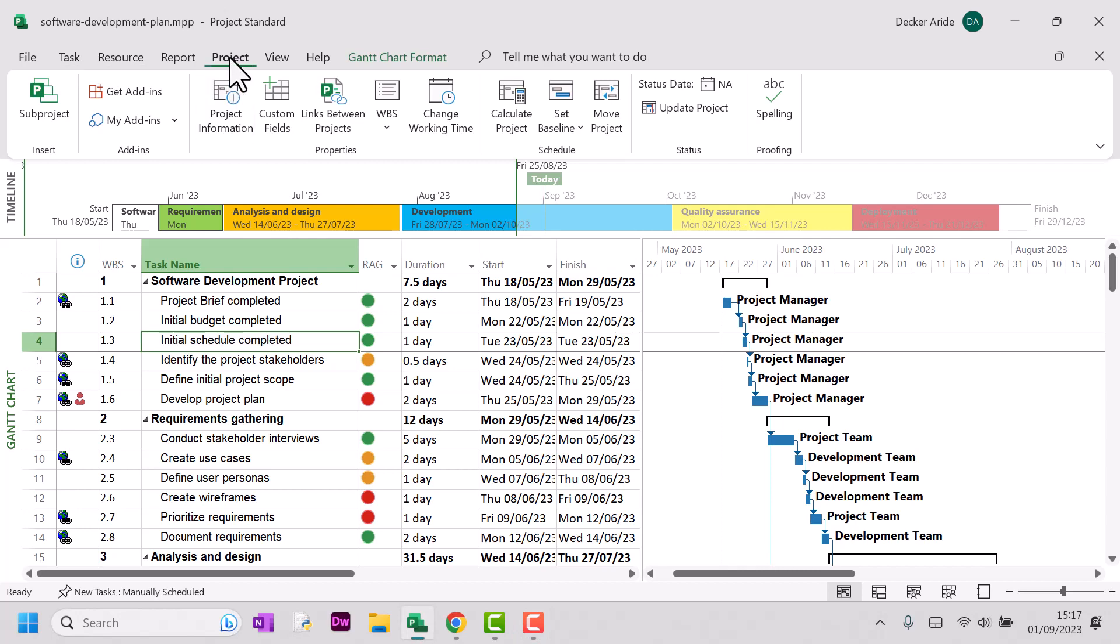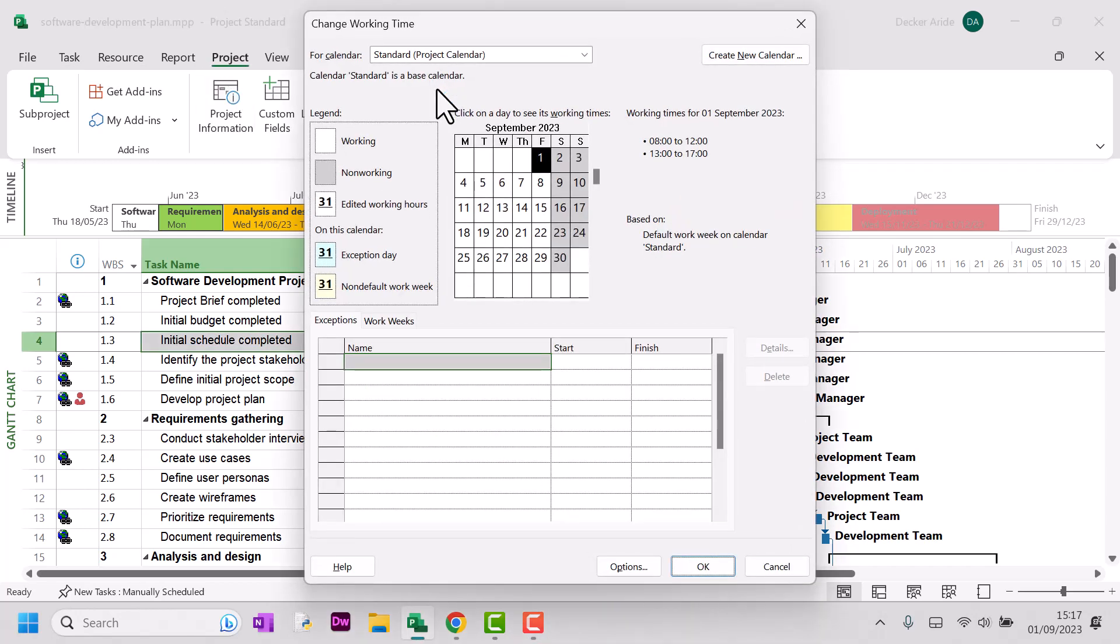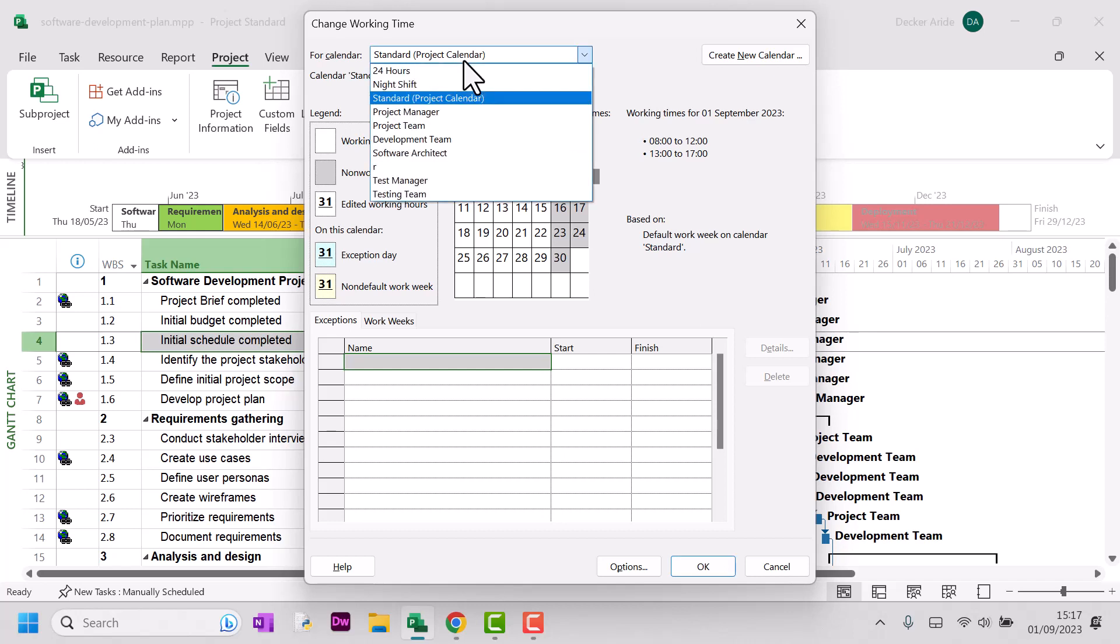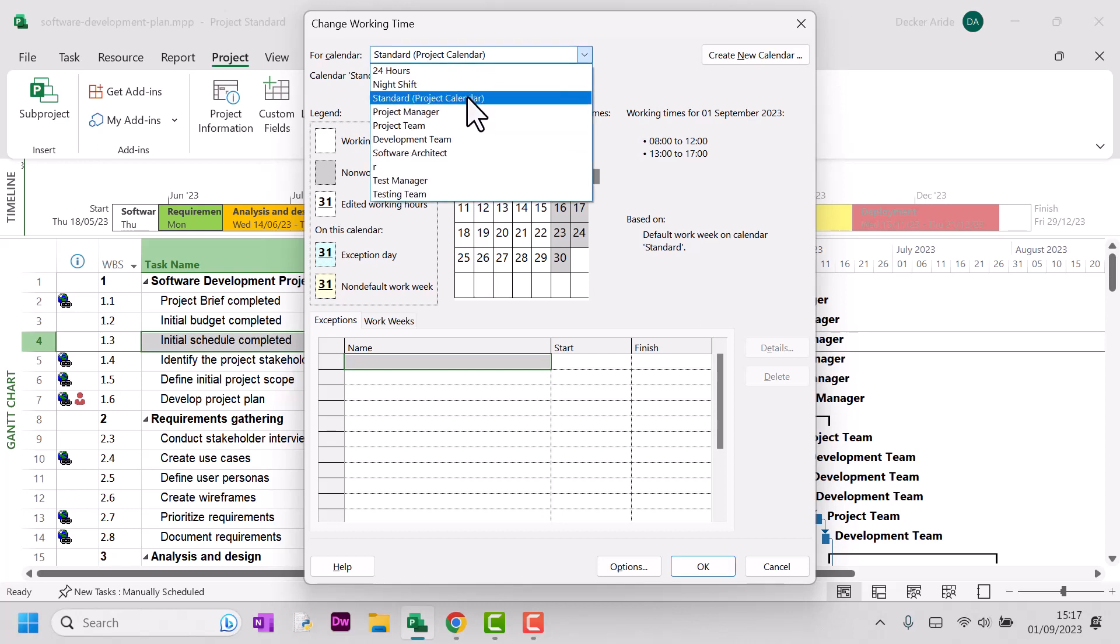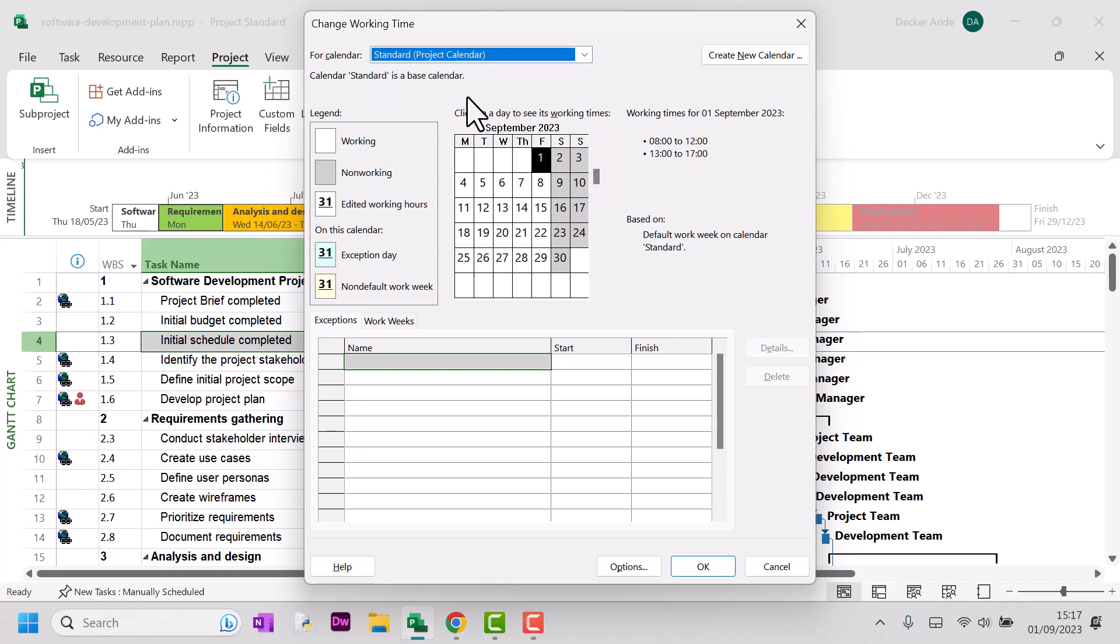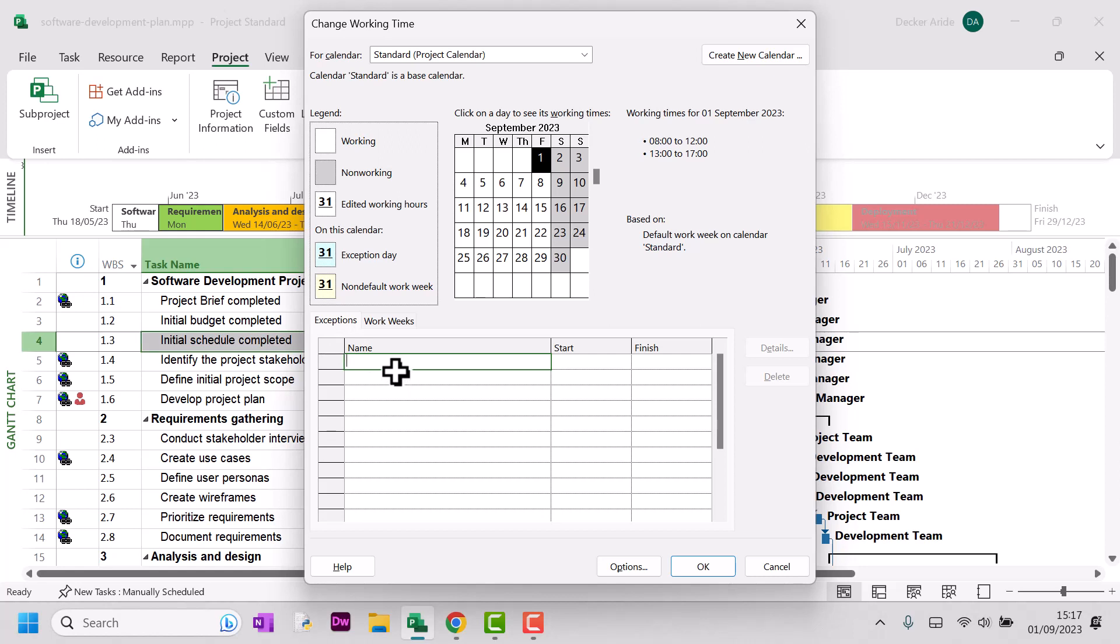First you need to go to the project tab and then click change working time. We're going to be updating the standard project calendar, so that's the default one. And what we need to do is put in here under the exceptions tab our non-working time. Let's start with Thanksgiving.